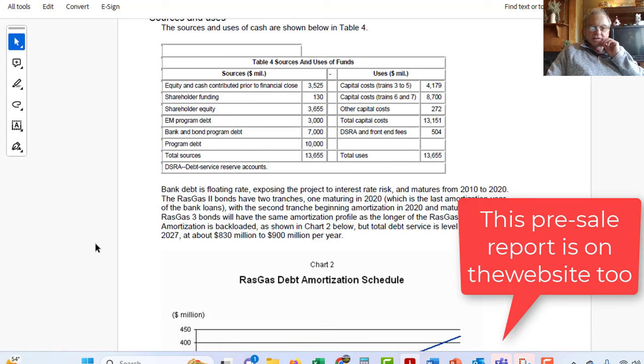The first thing is they did mitigate the construction risk. They did mitigate the volume risk. But now you've got to ask, what's going on here? How can this have such a low break-even point? And then they give you the prices, and then you can make a little cash flow waterfall where you put in the debt, and nicely they gave you the debt, and they didn't start any debt repayments for a few years after the construction is finished. And then I computed the equity IRR, which we'll talk about in a minute.